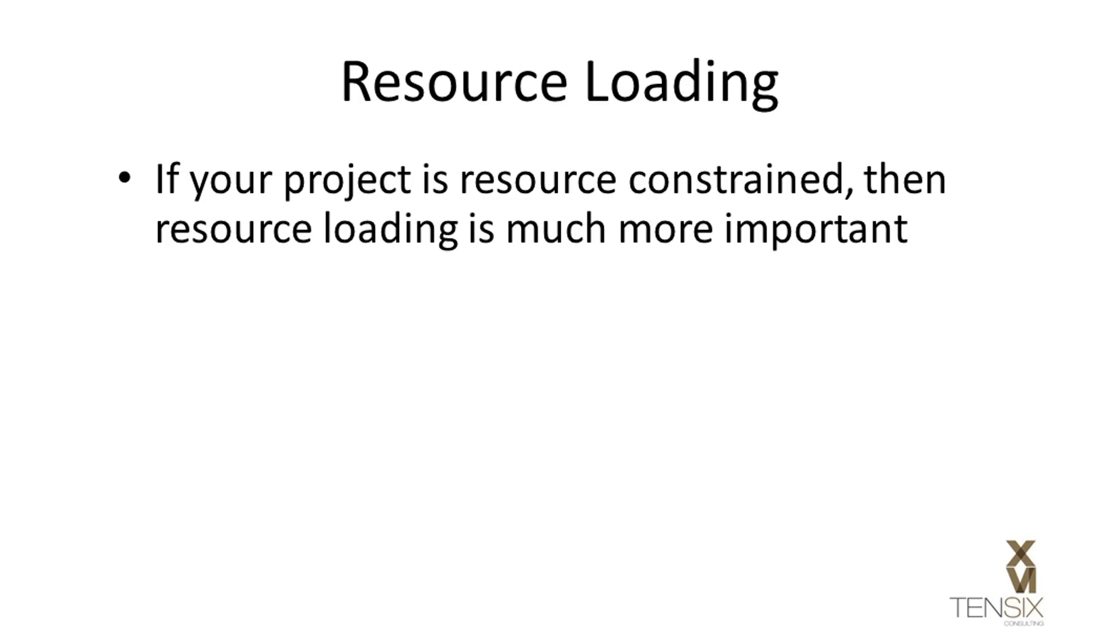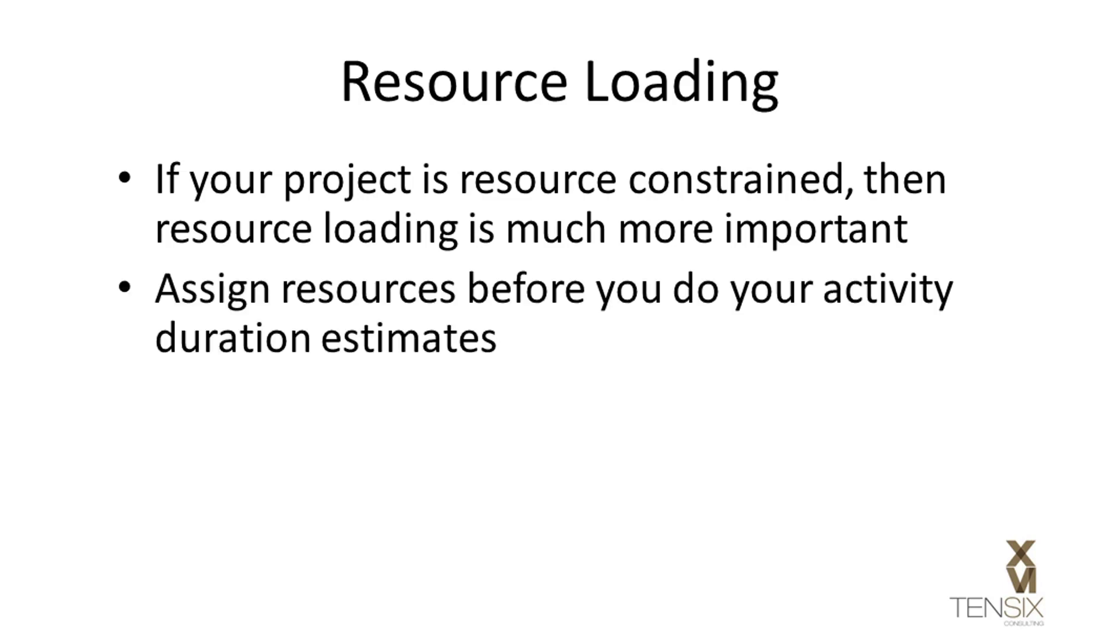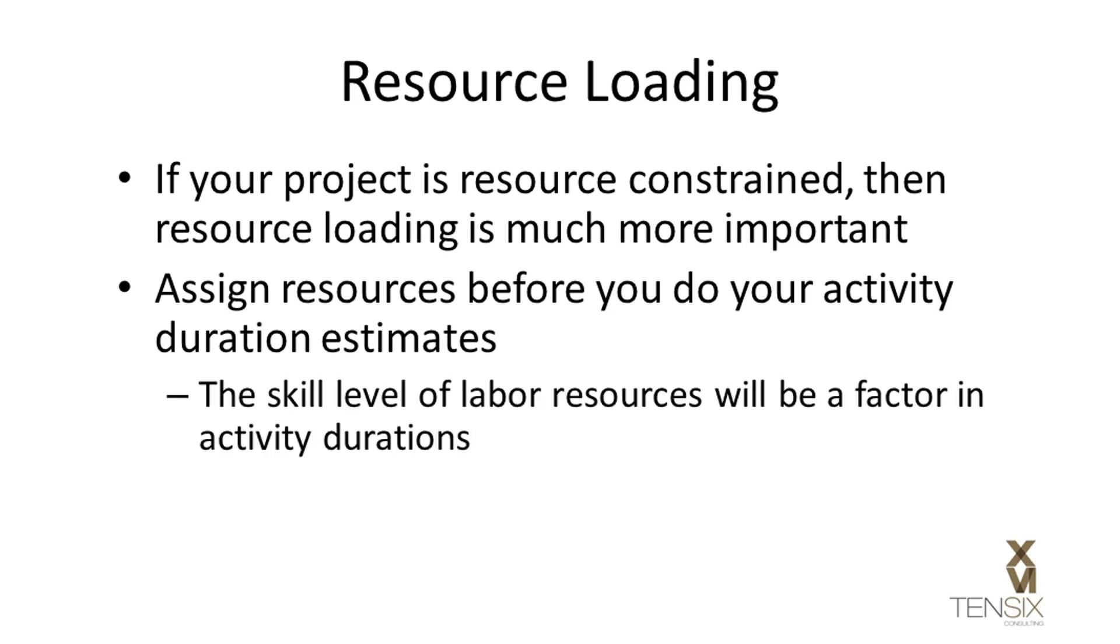Indeed, if you intend to resource-load a project, it is preferable that you assign your resources before you start work on the activity duration estimates. This is because the resources you choose will influence the duration of the work.